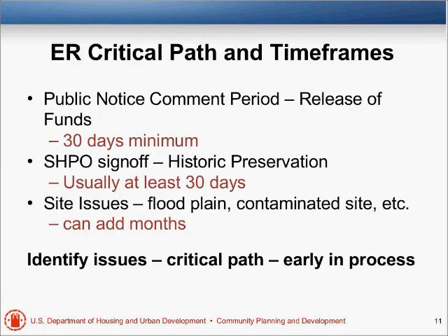Now, one of your first questions might be, well, how much time does this take? And the answer is it depends. It depends upon issues. If you have a lot of issues, that's your critical path, and it might take a long time to resolve that floodplain issue. It might take a long time to resolve that contaminated site issue, and that's another reason why you want to start the environmental review process as early as possible to identify these issues and work through them so that that's not what's holding up your whole planning and development process.